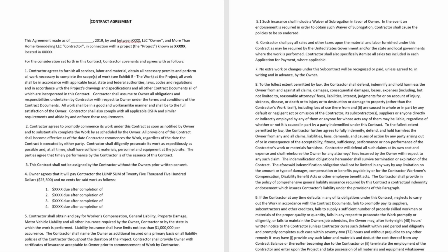You want to have milestones they must reach in order to get paid. And last, and again, it's all about protection, is language about indemnification. If they do something wrong, they need to defend you. Also, you need to clarify things like permits and many other avenues.